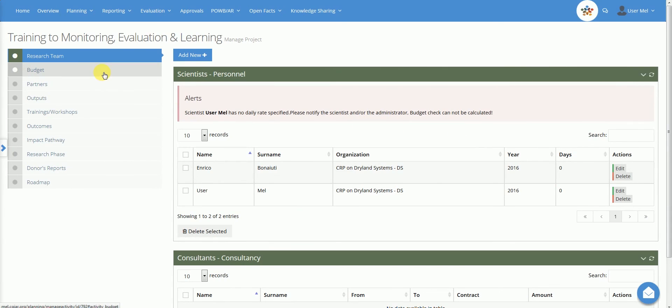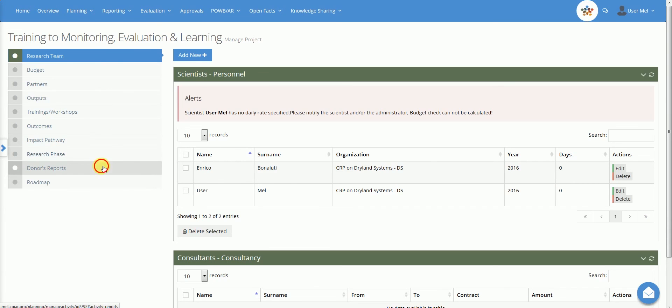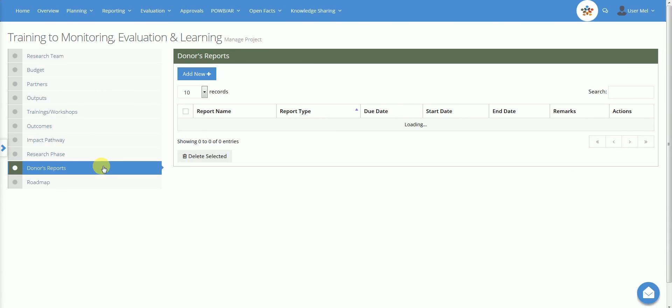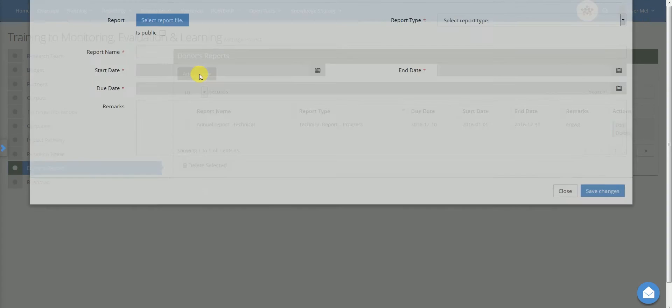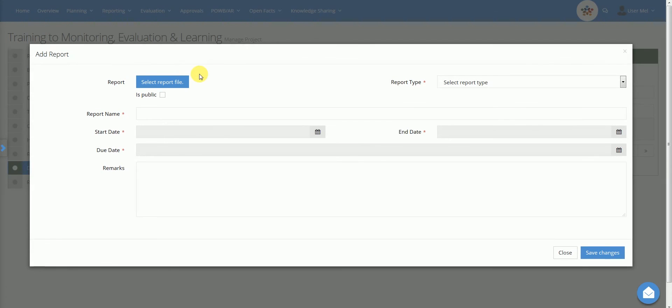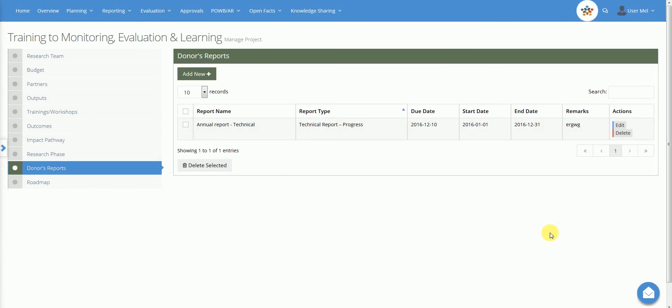The donors report section provides the user with an overview of the reports planned and submitted to donors. The project manager, if the system is not synchronised with OCS, adds the expected donor's report name and type, specifying the related period for the document and the due date with additional remarks. Two months, one month and one week before the due date, the manager receives a reminder to upload the file. Once uploaded, a centre workflow will start for clearing the report before sending to the donor.